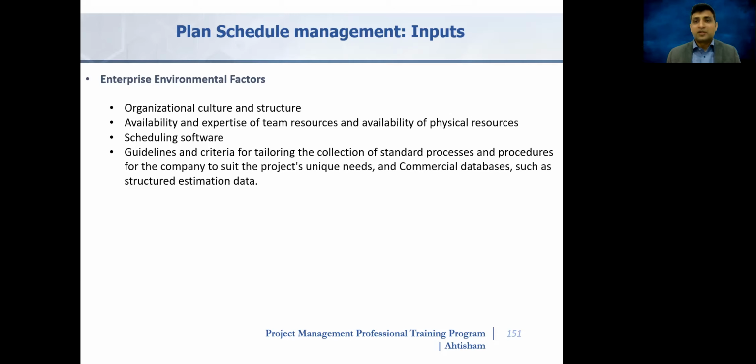Similarly, the structure of the organization, whether you're working in a functional, projectized, or matrix organization, will limit your options in scheduling. Definitely, as an example, you may have to negotiate the resources with the functional manager. So there are plenty of approvals that you have to go through depending on the structure of the organization. But we have to think about resource availability as well: when people will be available, and when material and equipment will be available, because that certainly affects our scheduling options.